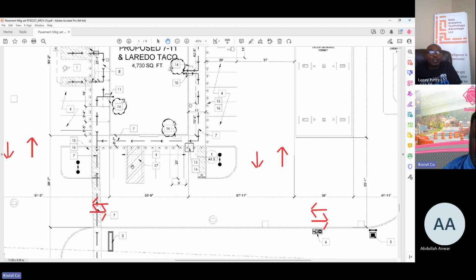Each one of these lines is paint. So what we did was we developed geometries. This is a simple rectangle, so all we would need to know is the length here and the width. We come up with the area in square feet, so that we can take a third of that. The reason being, we're not painting the whole thing white. We're only painting these diagonals, and we have formulated that these lines represent one third of this area.